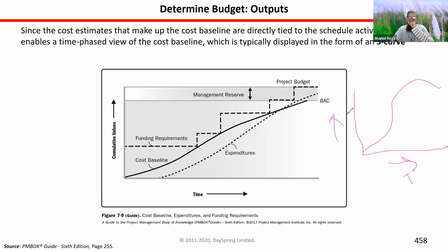In the practical field, we use the S curve frequently in different projects, because this S curve will give you the progress report and the expenditure report: what was the plan, and how much you are actually spending. That figure you can see from here. Say at the beginning, we have drawn this figure with our plan, the project budget or cost baseline. And when we are actually spending the money, say after 3 months, if you draw how much cost you have actually spent, then maybe the figure will be below this line or above this line, or maybe on the same line.